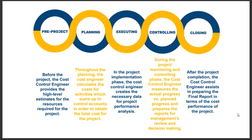In the pre-project stage — or before the project begins — which in project management terminology we call the initiating phase, the cost-control engineer provides high-level estimates for the resources required for the project to be completed. Before the project begins, a series of analyses must be done, which could include net present value analysis, return on investment, internal rate of return, or payback period.